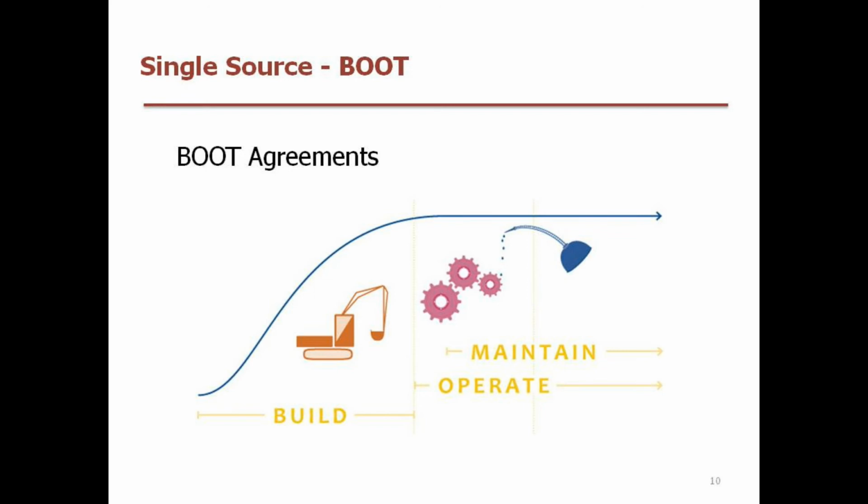If we look at a simple diagram to show the flow, the consortia or the organisation is invited to bid. The land is usually leased from the government. The government needs to monitor performance during the transfer period. This is always the case. But really, as I said before, there must be something in it for the consortia or the organisation to take this on, because of the single point of responsibility and the risk for the consortia. But having said that, there's a guarantee for the community as well.